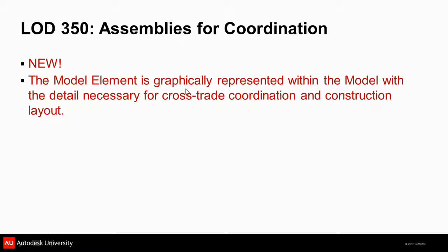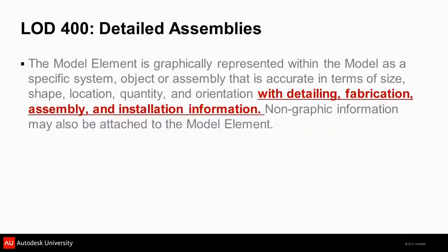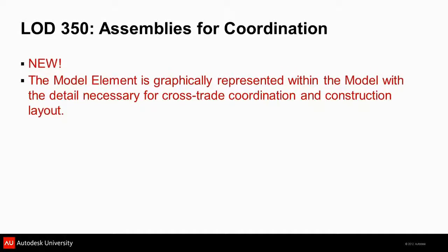One of the things the committee is looking at right now would be, is there a known step that needs to happen, a known use, in between when an element has design intent level information but yet short of total fabrication? And I'd submit to you that perhaps there's this level in between that needs to happen. So we can discuss that. So I'm saying 350 is when you'd have cross-trade coordination. Once an element gets to a certain point, is there information that only a trade would have?